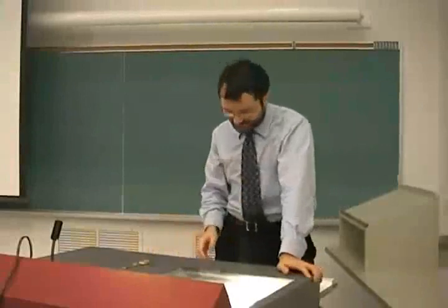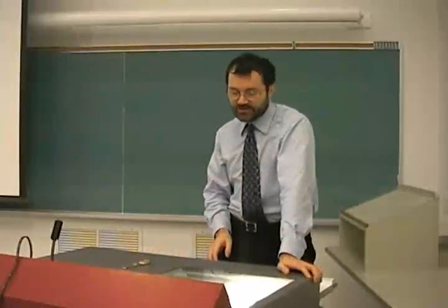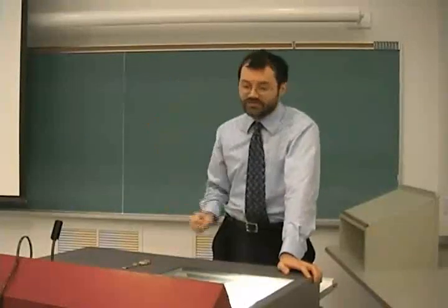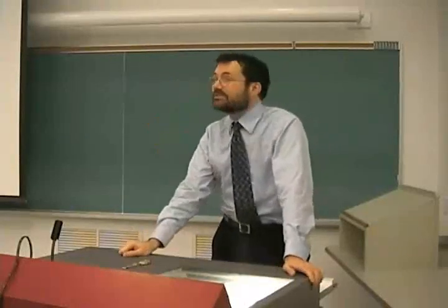So I suggest that you do a range of estimates and make sure that you do a pessimistic estimate, and make sure that you identify those things that will give rise to that pessimistic estimate.